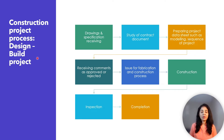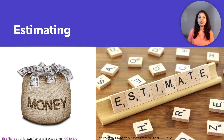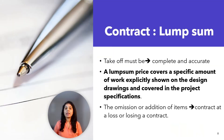When the project is advertised for bidding, the owner must provide sufficient information in the form of scope, structural design drawings, details, specifications, and other descriptive data to enable the fabricator to prepare a bid. As the first step in preparing a bid to furnish structural steel at an agreed price, the fabricator's estimating department prepares a detailed list or takeoff of all pertinent material shown in the structural design drawings and determines the associated cost and labor. Where the basis of payment is a lump sum, it is particularly important that this takeoff is accurate and complete.